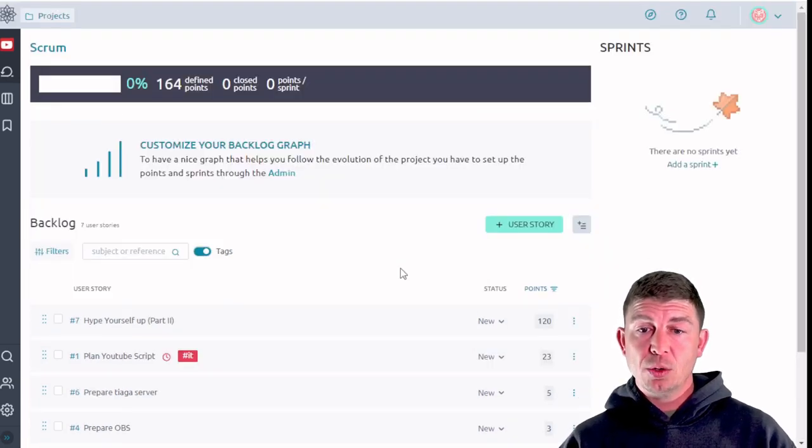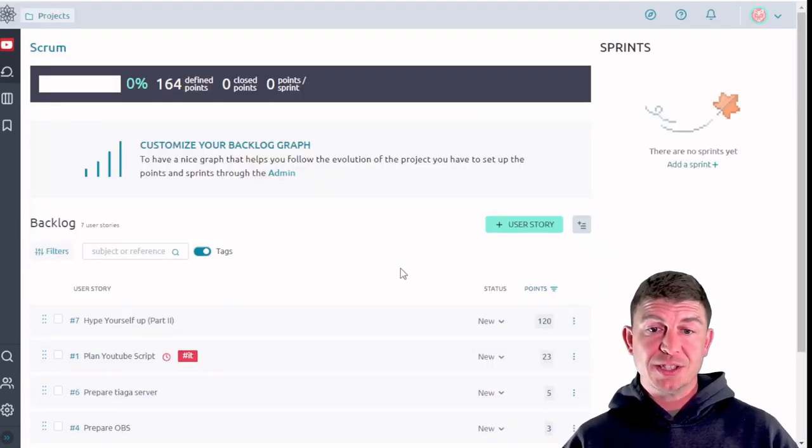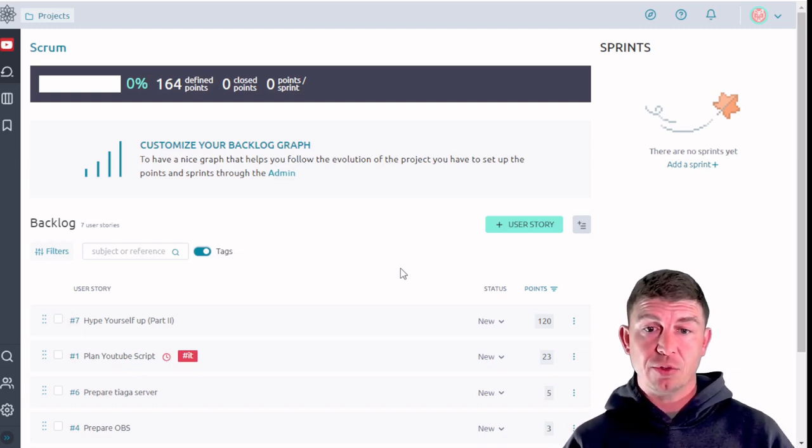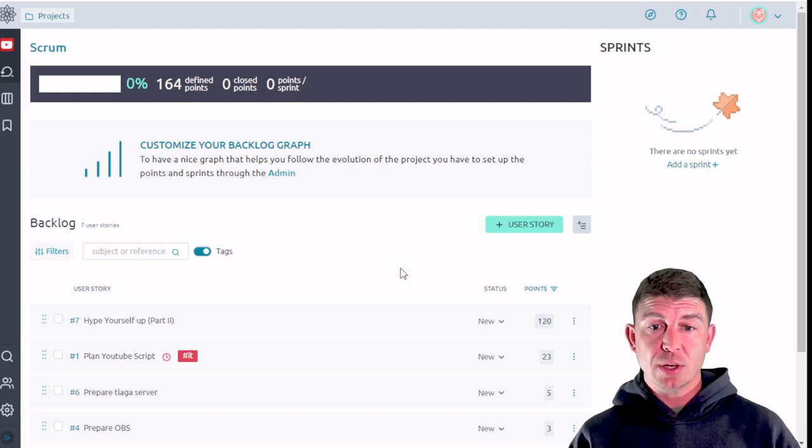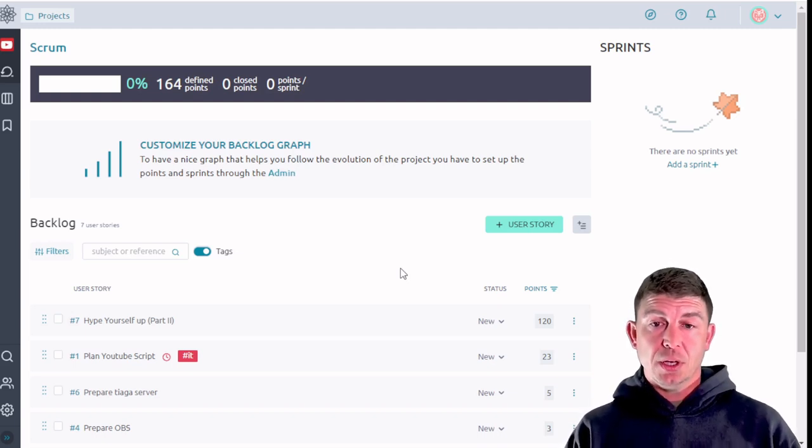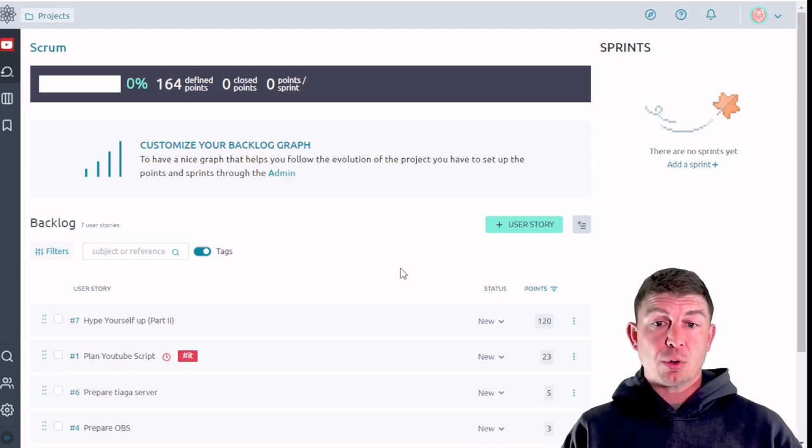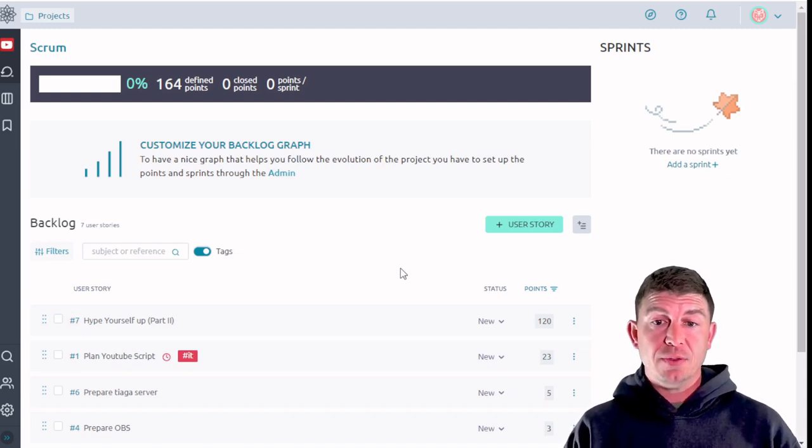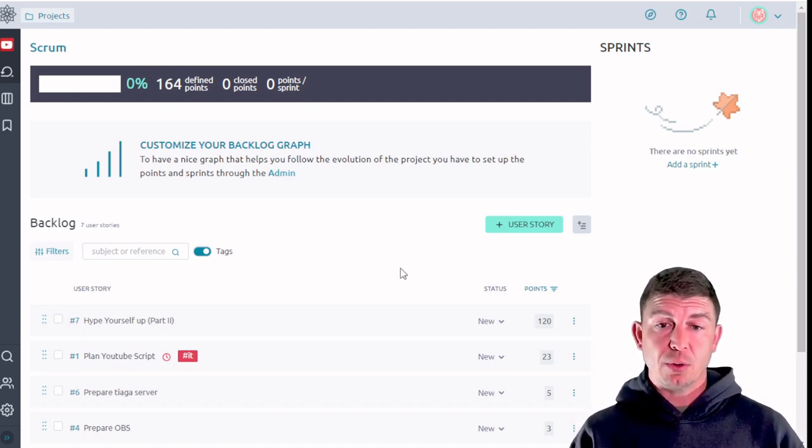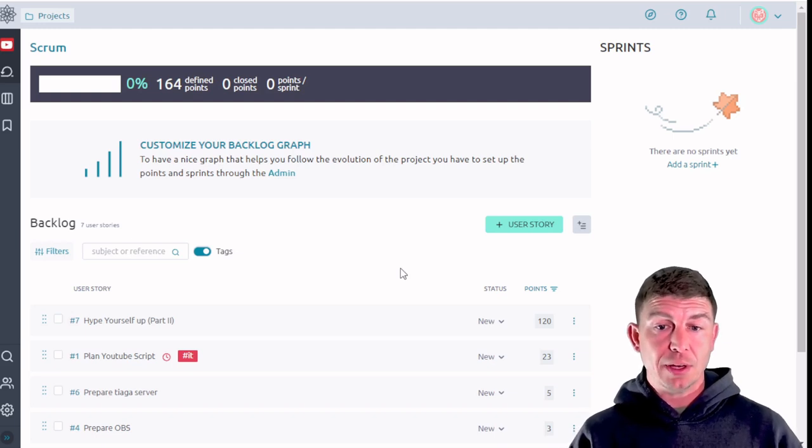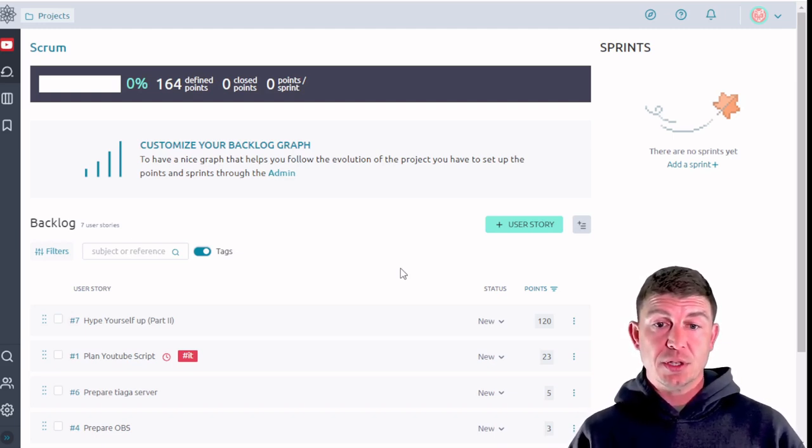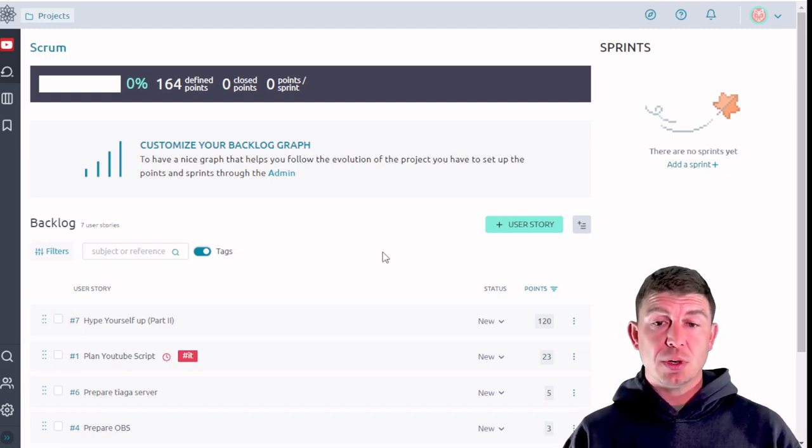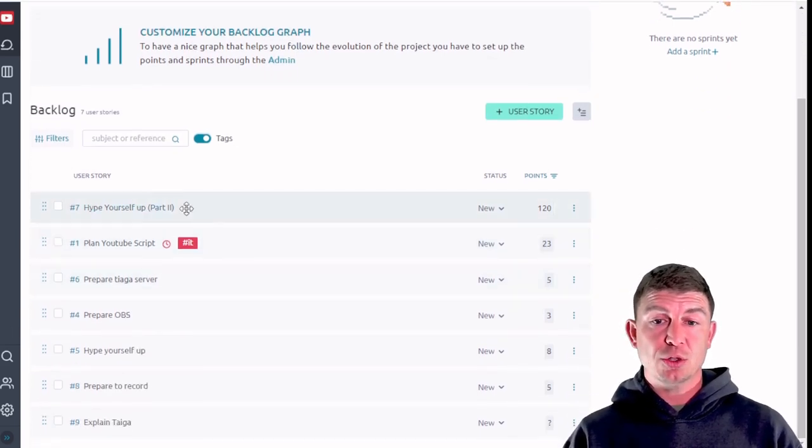Real quick before we go any further I want to explain where the scrum methodology came from. So scrum is primarily used in software development type environments. So if I have a program that I've put out on the market and I get feedback with users asking for a specific feature or they're having a problem with a feature that's built into my product, they're going to give me feedback and each one of those is going to become a user story.